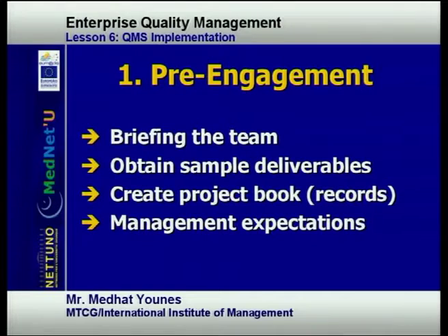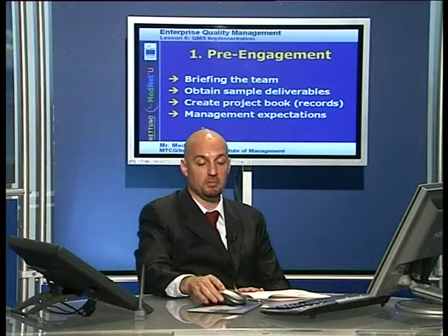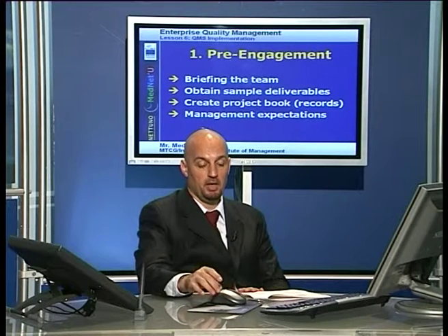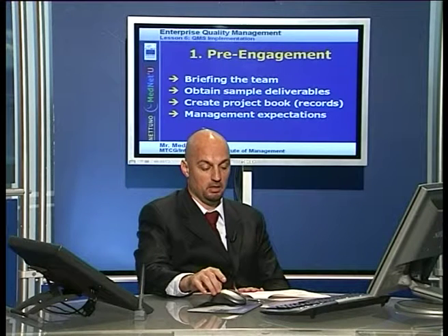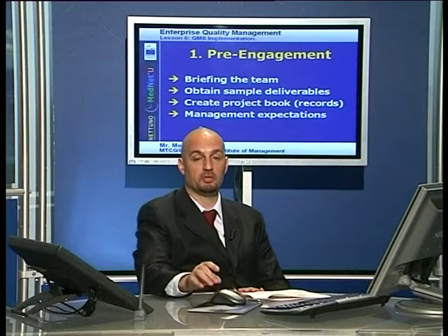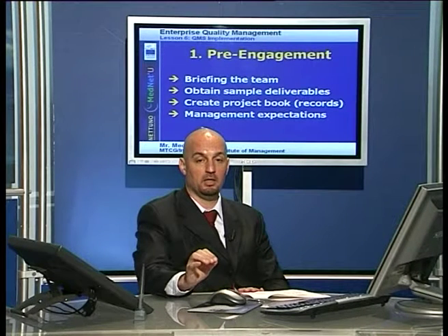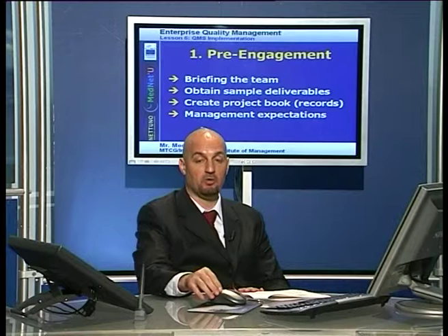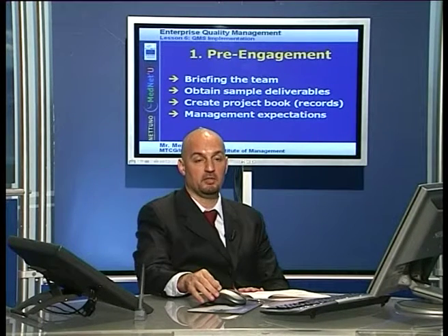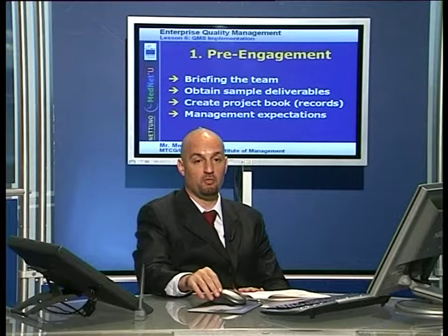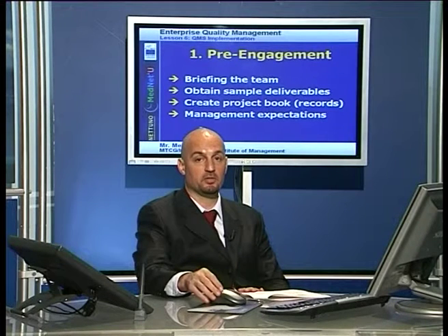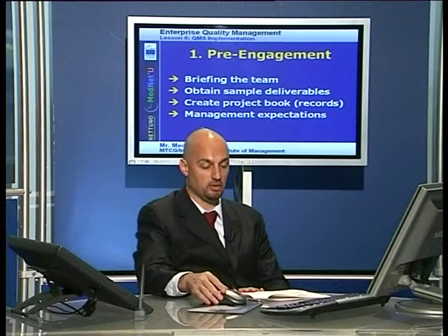Always manage expectations. And with managing expectations, a very important trick for a management consultant is to under-promise and over-deliver. So if you think that a project would take, say, 4 weeks, make sure you ask for 5 weeks so you'd have a tolerance factor in case things come up during the project implementation.